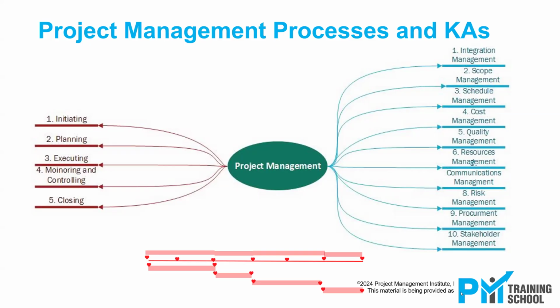But if the project is complicated, I say, okay, in phase one, I will have 3 sub phases. For example, you are doing ideation. So I would say first we will have gathering of some data, and that is sub phase one. And in sub phase two, we will analyze that data, and sub phase three, we'll brainstorm on it.